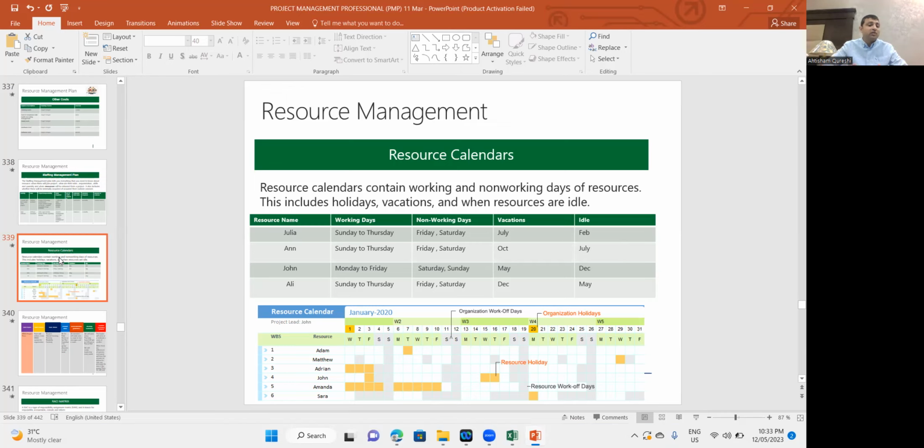And if there is a major milestone, let's come back and connect with our question. That question was telling that the project manager is worried because major deadlines were getting missed. This situation could have been avoided if, near delivery of a major milestone, your staff has planned for annual leave, you should have negotiated with him that you go after delivering this milestone so that we should not get impacted in the project.